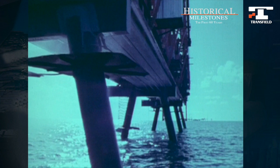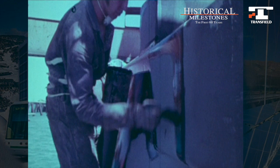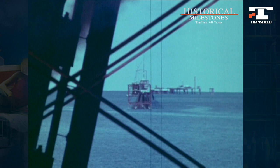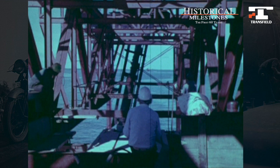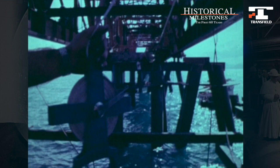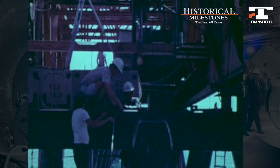After welding, the joint was sandblasted and painted with a tar epoxy system, ensuring continuous anti-corrosion protection. The approach jetty was constructed from two faces simultaneously. One crew working from the shore, another from a point 3 kilometres offshore, both heading out to sea, where a third crew was constructing the loading wharf. This was necessary to complete the project within the tight 25-month start-to-finish deadline.